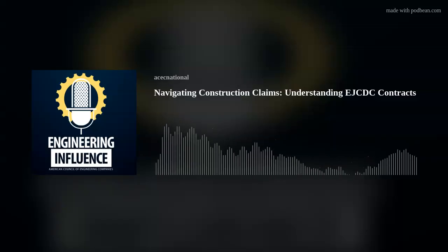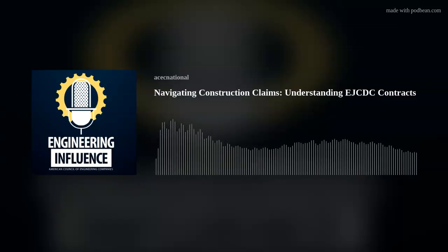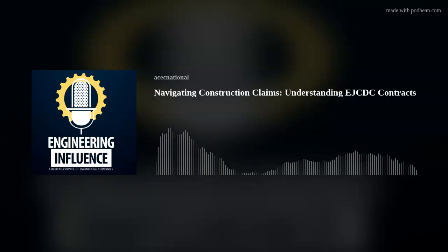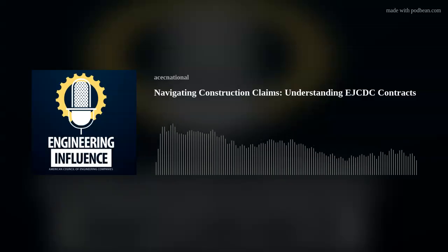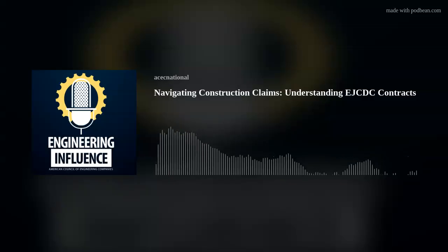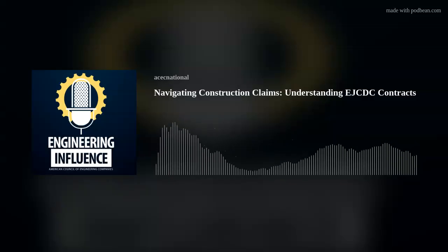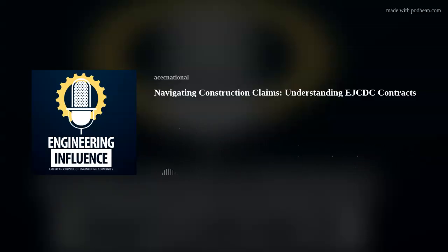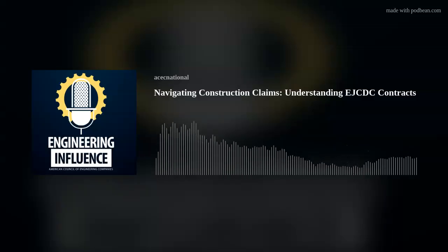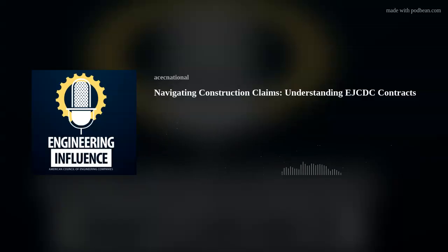So there are a lot of different ways in which the information on subsurface utilities can be collected and depicted on the drawings. The contractor is supposed to have a certain right to rely with reasonable accuracy on this, but the EJCDC requirements on underground facilities acknowledge that some stuff is probably going to be different. It requires the contractor to carefully excavate ahead of their excavations, especially if we're trenching, to locate these underground facilities without damaging them.